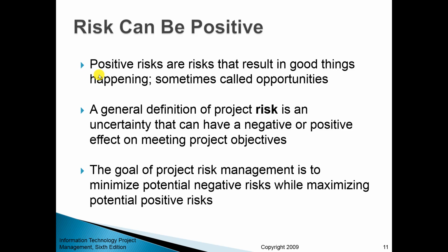An example of a positive risk would be obtaining additional funding, something that you didn't expect at the beginning of the project. Let's say, while working on a project, you get awarded a particular grant from the government that expands your opportunities and resources, and you didn't really count on that. So now you're in a better position to complete the project within the specified budget and timeline.